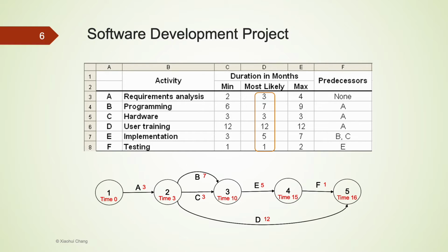Using the same kind of strategy, we can fill in the rest of the diagram. From the second checkpoint to the fifth checkpoint, which is also the last checkpoint, it would take 16 minus 3, that's 13 months to complete. During these 13 months, we should be able to complete activity D, which usually takes about 12 months. It is also interesting to realize that both activities C and D are not very crucial here, as a short delay in these activities would not result in a change in the total completion time of the entire project.